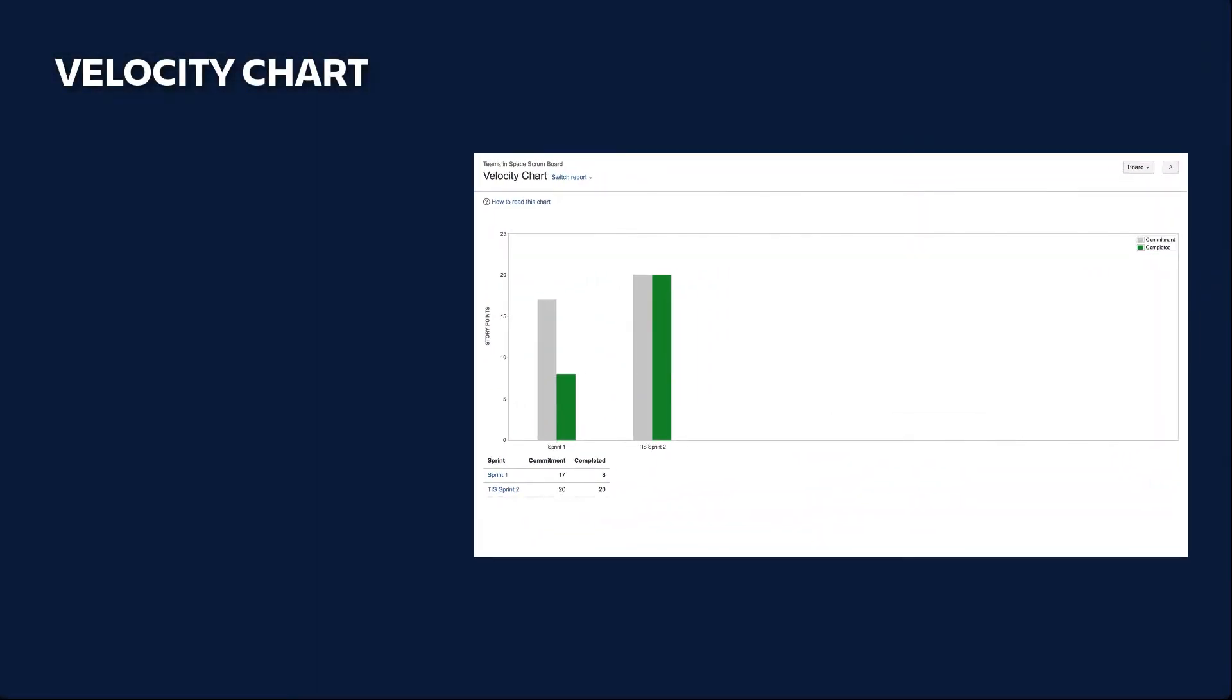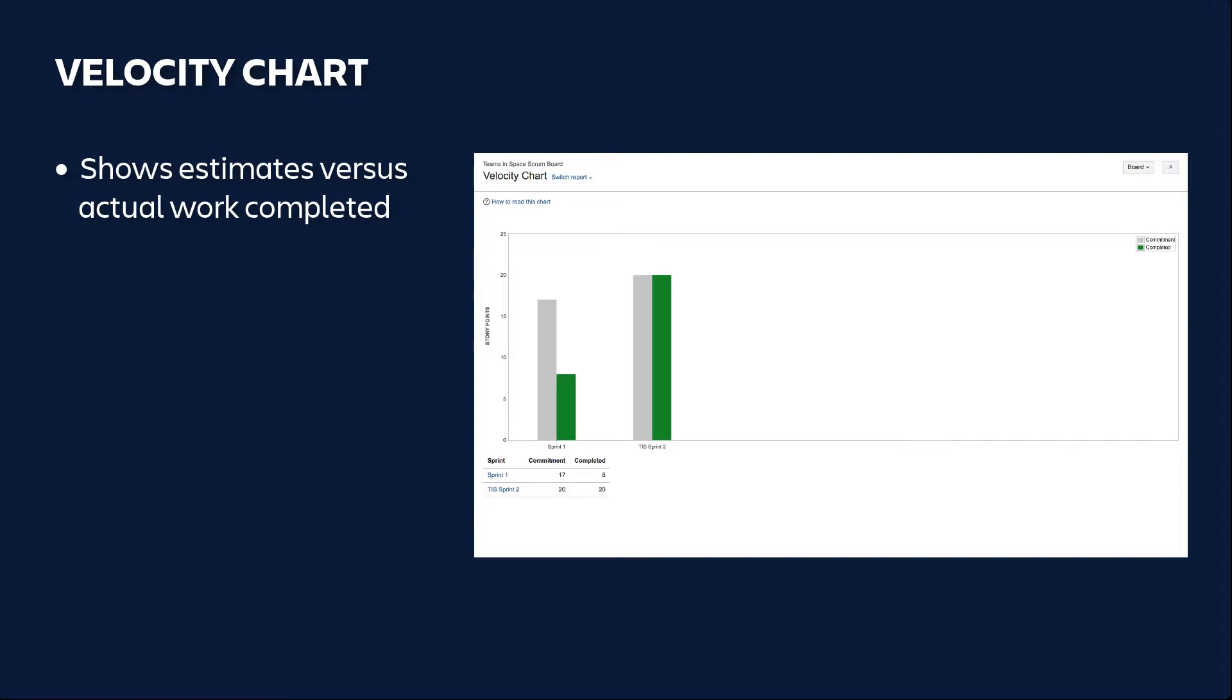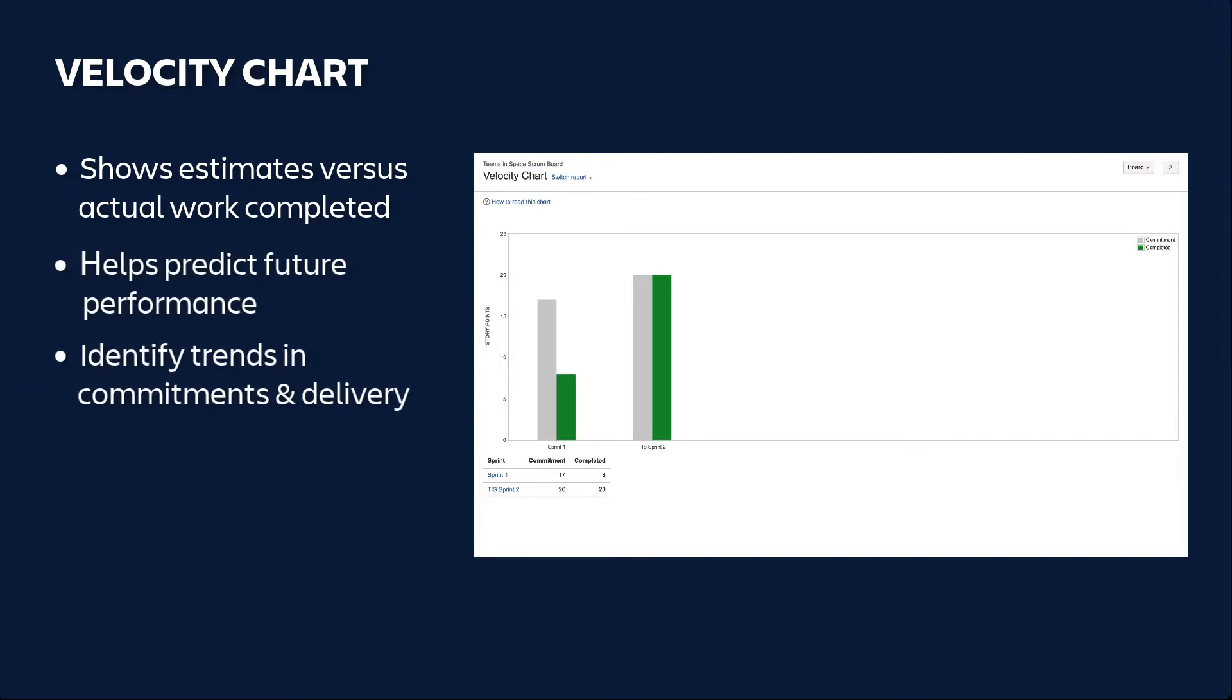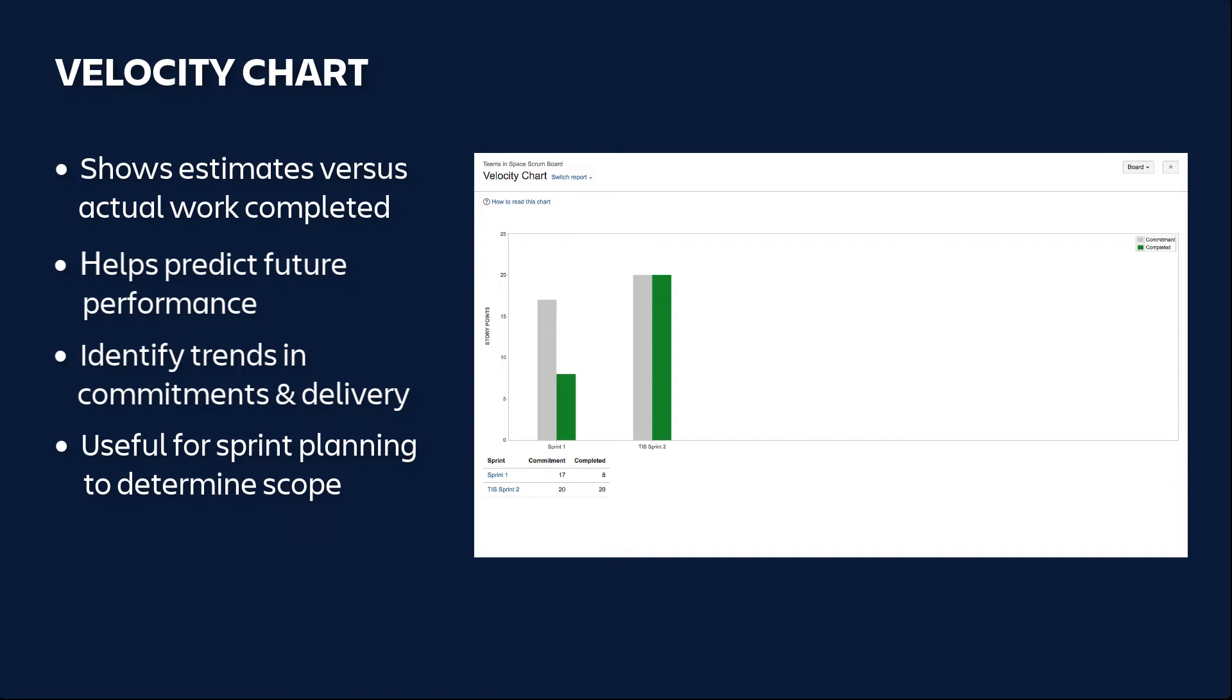The Velocity Chart shows the amount of work estimated versus the actual amount of work completed in recent sprints. This enables you to use past performance to help predict future performance and to identify and address trends in team commitment and delivery. The Velocity Chart is useful in your sprint planning meetings to help you decide how much work you can feasibly commit to.